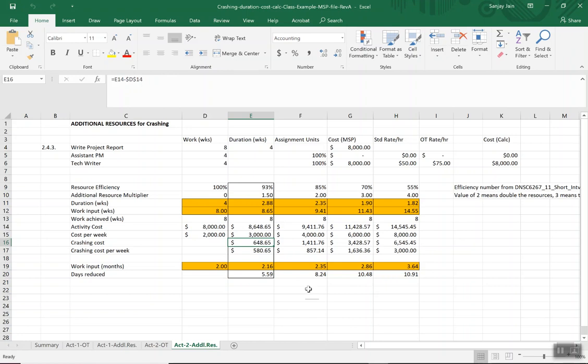But just in case on a project where you do not have additional resources available, then you can use this option of having people working overtime on weekends. Of course, you would not want to have them working that long term, 3 to 4 weekends. That probably is as much as you want to do. And of course, it will depend on the particular resource and their constraints on weekends. I will stop here.